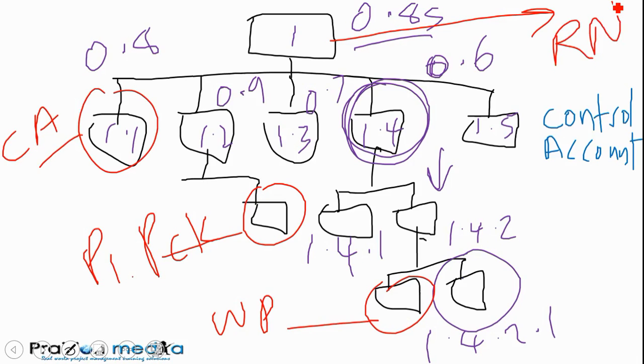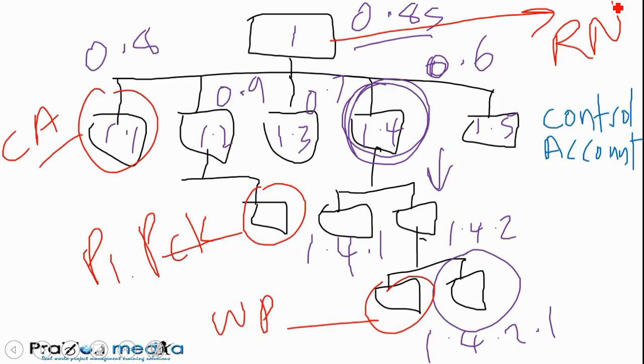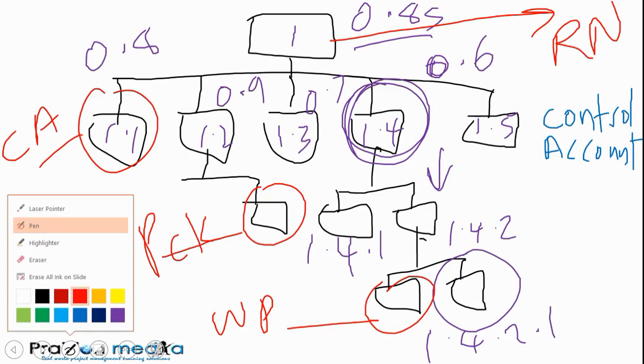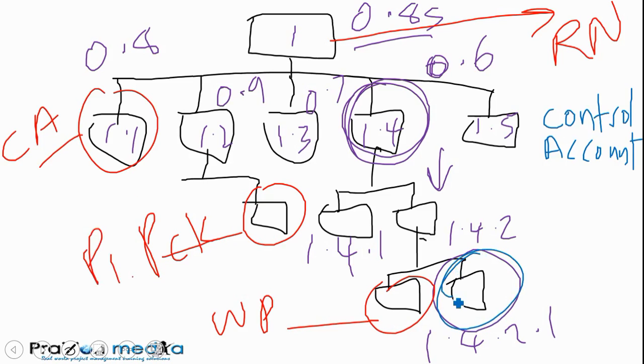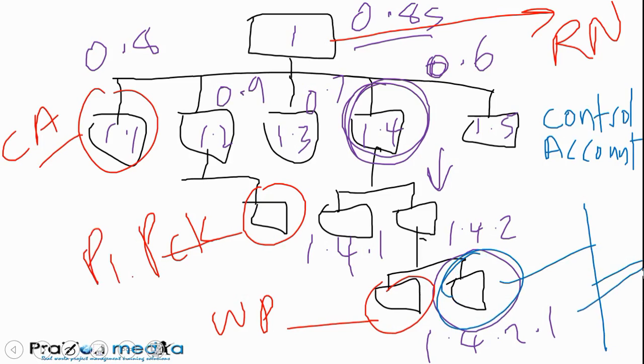I hope that helps as far as understanding what Create WBS is all about. Creating your work breakdown structure should be done before you proceed to create a schedule, develop a schedule. What will happen to the WBS is it becomes part of the output from this process called the scope baseline. But then you're going to take this WBS and decompose it from the work package level, and you're going to break that down into even smaller pieces. That's what we're going to look at in define activities, which will be our next process.